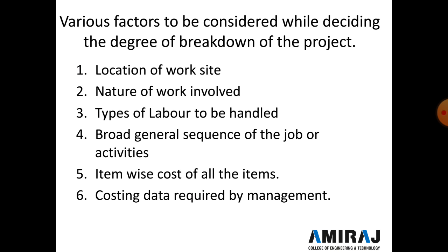After preparing the list of activities, the relation of these activities is decided and they are arranged in a proper sequence or order in which they are to be performed. When the project is split up in this way into various functional elements, this will not only help in preparing the network for the project but also in planning and scheduling the activities.